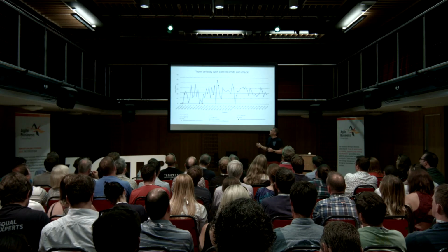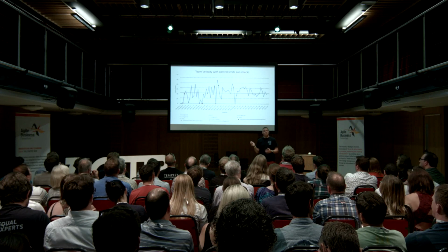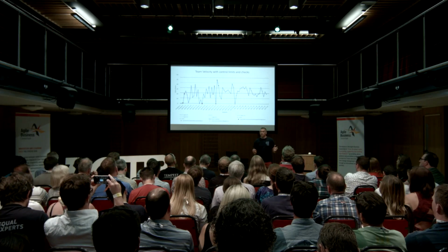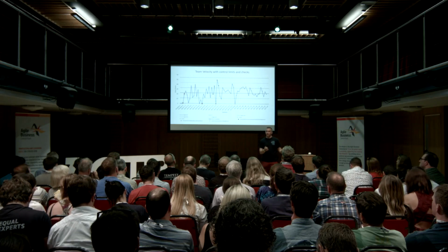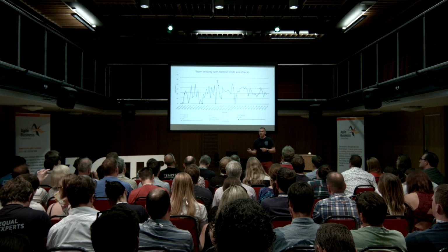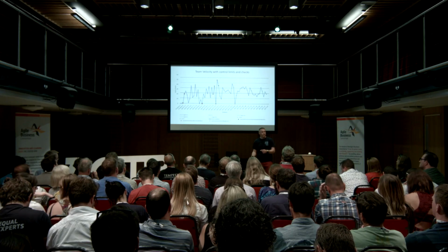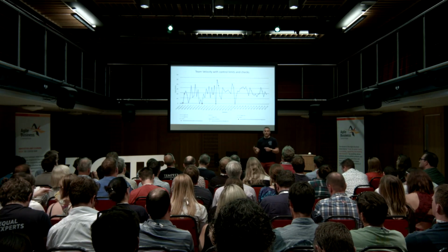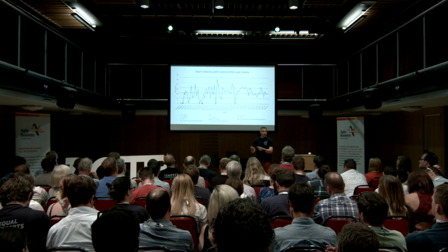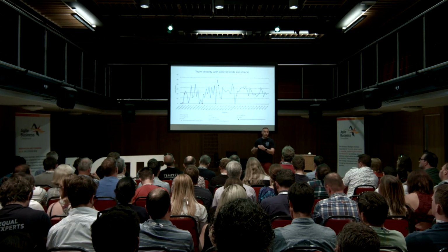So when you look at that, this is something you could bring back to your team, and it might be that your team are consistently bringing too much work into a sprint. So you're always rolling a piece of work over, and then the next sprint is slightly artificially high, and then the next sprint you carry on the same trend. You have a little bit too much work, you don't finish it all, so you're a bit low, and then you're a bit high the next time.